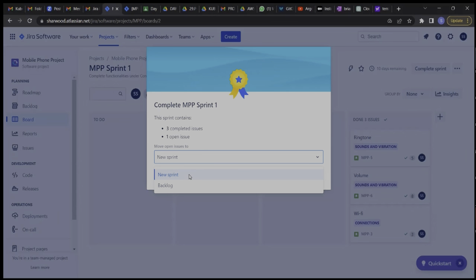I think the points should reduce because it was already being worked on before now. Okay, good. So we'll send it and then we'll estimate it. We are not going to leave it at that. Whether it's going to the next sprint or to the backlog, either way we are re-estimating the story, because now it will require less effort because we already started working on it.